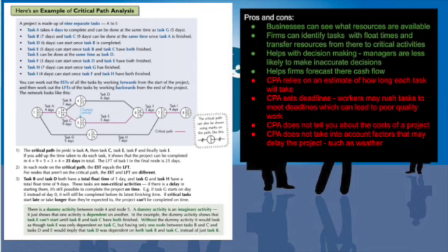Now moving on, you have task D, and that takes 6 days. And just to let you know, the duration is always written under the task D, on the little line. That's where you always find the duration of a task. And that can be started once task B is finished. And now you have task E, and task E can start once task B and C have both finished. They both have to be done before you can actually move on to that one. Although it can also be done at the same time as task D.